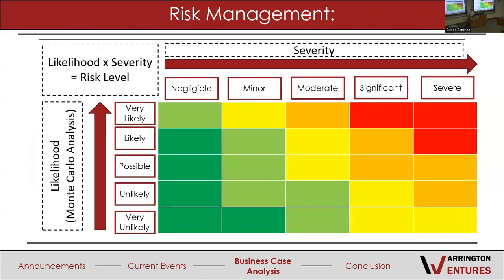Risk management requires looking at both likelihood — the probability of a risk, which can be assessed through Monte Carlo analysis — and severity, how much money you'd lose if that risk actually happens. You quantify risk level by multiplying likelihood by severity. If a risk is very likely and very severe, you need the strongest mitigation. If it's very unlikely and won't significantly affect your revenue or profit, it's less of a concern — maybe put something small in to mitigate it, but it won't affect you in the long term.